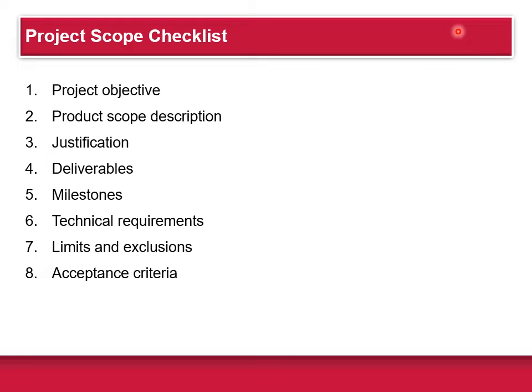Our system maintenance and repair will be done only up to 1 month after final inspection. And the client will be billed for any additional training beyond that prescribed in the contract. Exclusions further define the boundary of the project by stating what is not included. Examples include data will be collected by the client, not by the contractor. A house will be built, but no landscaping or security devices will be added. Software will be installed, but no training given. So these limits and exclusions clarify what is not part of the project and is excluded from the project.